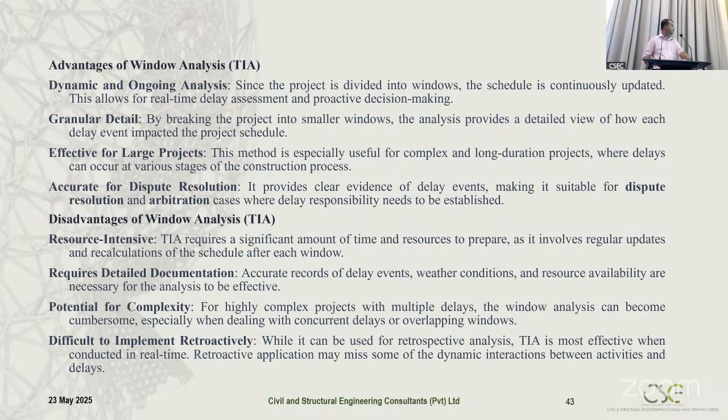In the window analysis method, the main advantages are that it is dynamic and ongoing analysis. It has granular detail, meaning we are dealing with small windows, so we can detail and analyze very accurately. It is effective for large projects because we work in small segments compared to the large whole project, which benefits the evaluation. This is much more accurate because it is dynamic and we can pay more attention, so there is much less chance of errors, and therefore this is the recommended method.